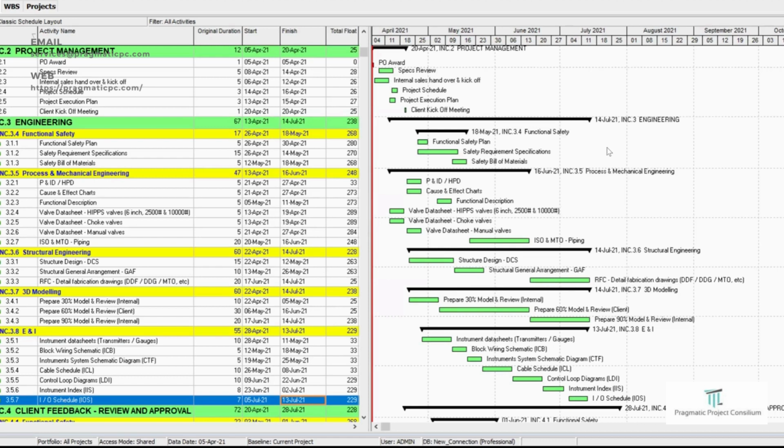However, in case of issuing your schedule report, it is strongly recommended to run a log, view the schedule log, and have it printed out along with your schedule. And this snapshot is out of Primavera, where you can hit run schedule, you can see view log, and you can have it copied and saved in a place. When you click on view log, this is what you will see. Now, how are we going to see the schedule log, the schedule report?